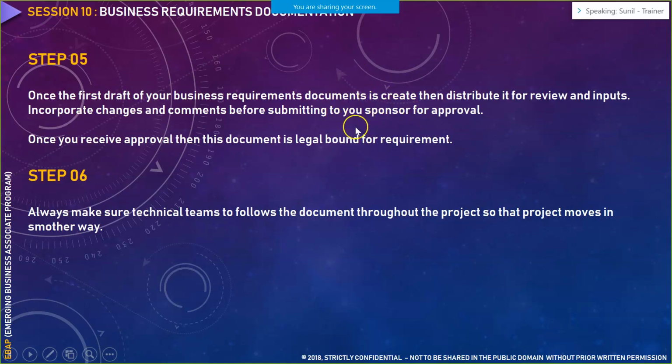Like today you start writing a BRD, next week you submit it, then it comes to me for approval. I request some changes, you would create a new version of it. New version as in whatever changes I have requested, you would add those changes and create a new version of it. The other day, someone else may ask a change, the respective stakeholder. So the third version, similarly 4, 5, 6, 7, n number of versions would be created for that particular BRD. And that particular process is called versioning in business analysis context.